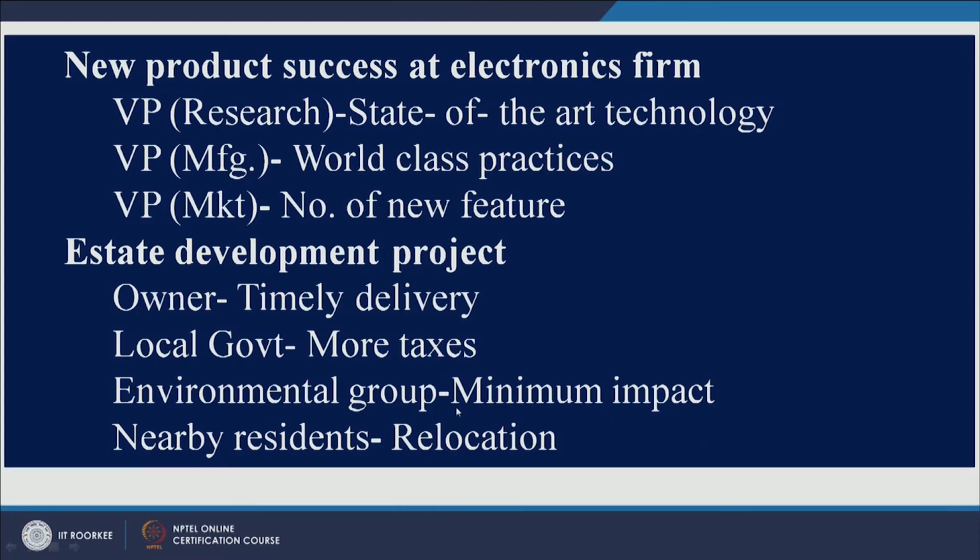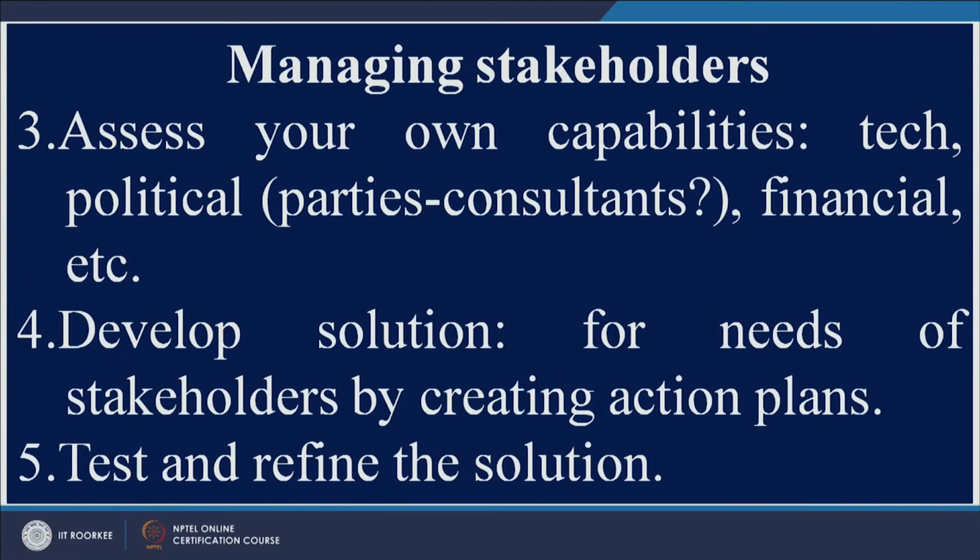Environmental groups, what do they want? They want minimum impact to the environment, and nearby residents do not want a new project near them because their lives would be affected, maybe positively or negatively. So, these stakeholders have got different objectives. You need to identify them and identify their requirements.